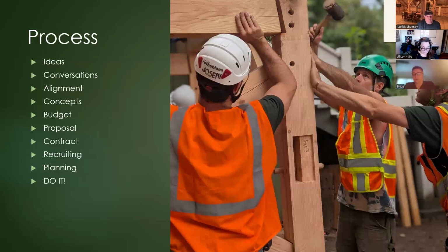Yeah, I would say it depends on the type of the building. An open air pavilion, you might need some architectural drawings for a permit. You might need a site plan, that kind of thing. But you might not need much else in terms of architectural drawings for a simple open-sided building. If it's a house, then of course it's very different. There's a lot more complexity, and architectural drawings would be required.